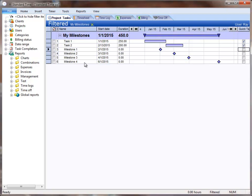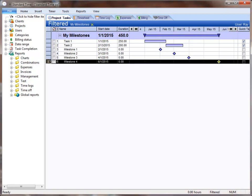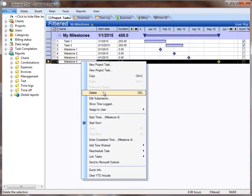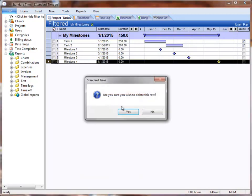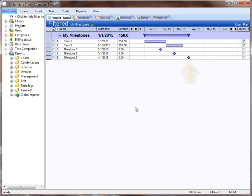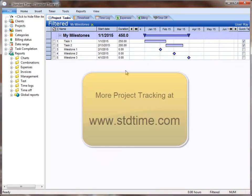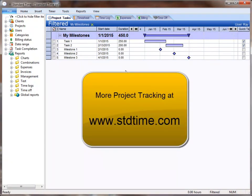If I were to right-click on one of these and choose Delete, you can watch the Gantt chart slide back to include just the time that would be covered by all of the remaining tasks and Milestones.